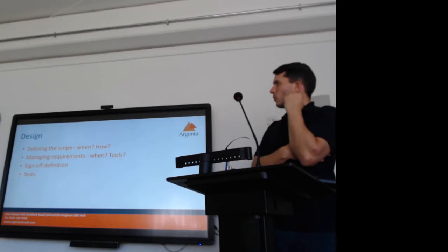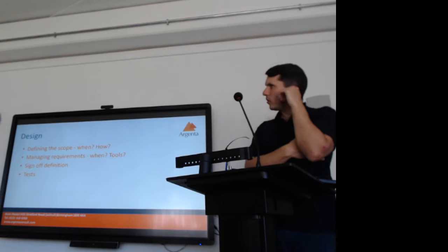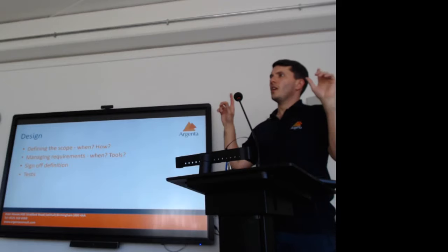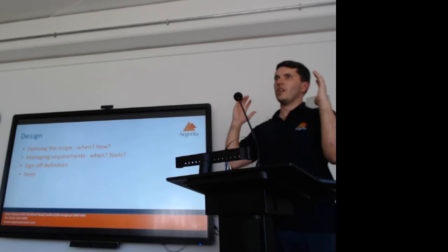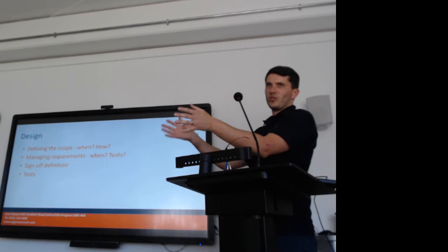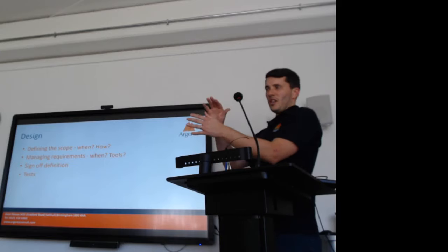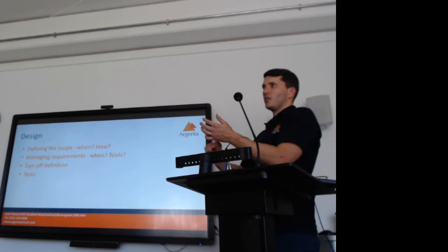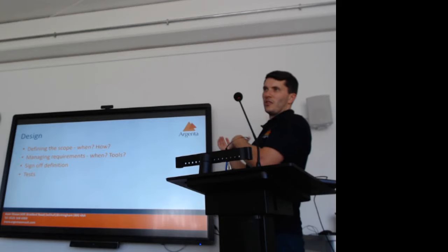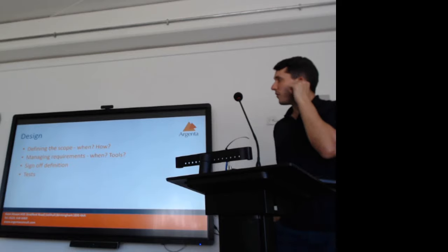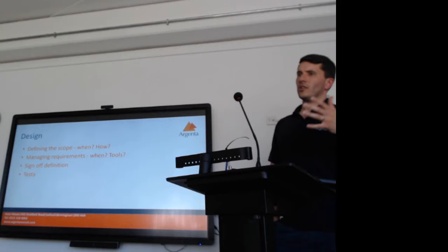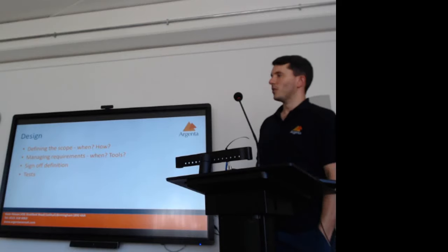Yeah, so I think one thing that is quite powerful is if you can define how you're going to validate the system, and that's definitely testing. So what's going to enable the customer to sign off on this? How are you going to ensure that you've got something written down that says if the system does X, Y, Z, that's sign-off for me, and you can sign that. We should be able to get that at the very start. I don't think we should be doing that halfway through or at the end of development. That should be something that's upfront, defined, and clear. Because then at the end, you're not wondering whether they're going to sign this off or not. You've got a clear remit of what you've got to do to get that signed off.